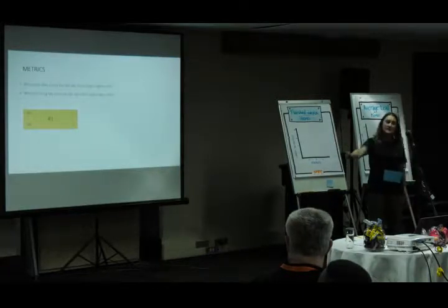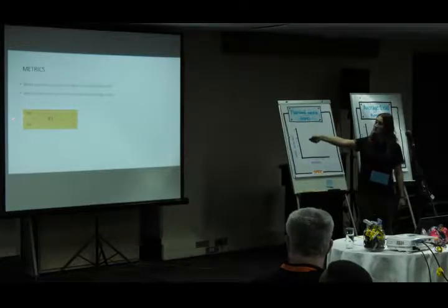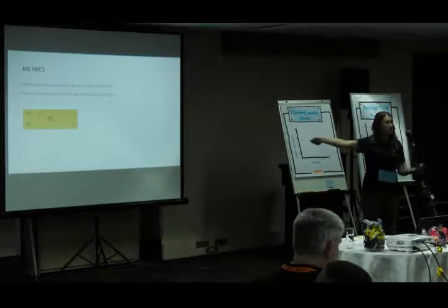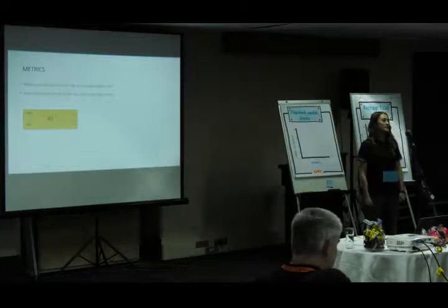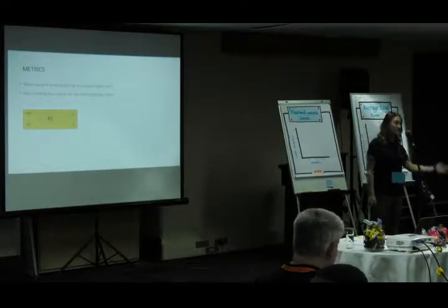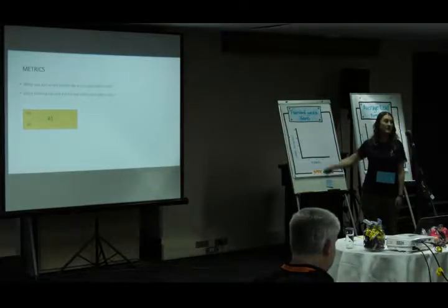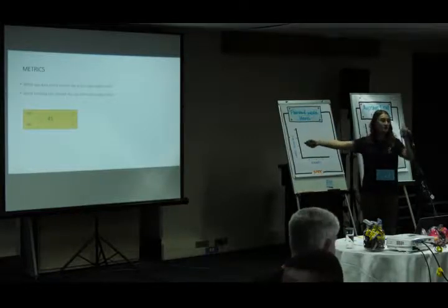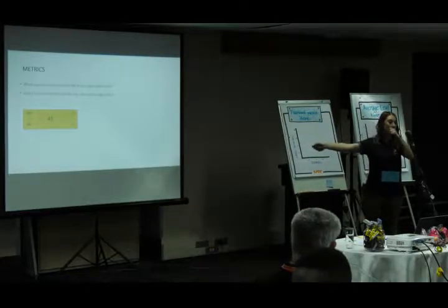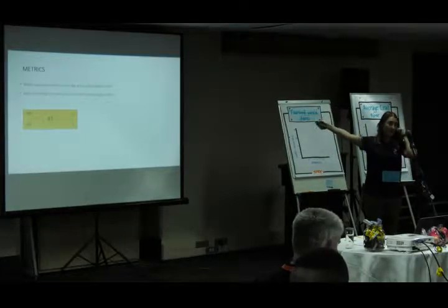Great. So some metrics and what we're going to write on these stickies. I mentioned at the top left is your initials. So if you pull a piece of work in on a sticky now, then you're going to initial the top left. The bottom left is your blocked status, blocked or unblocked. The top right is my start date. So if I've pulled a sticky in from ready to build, I'm going to write that day on the top right.